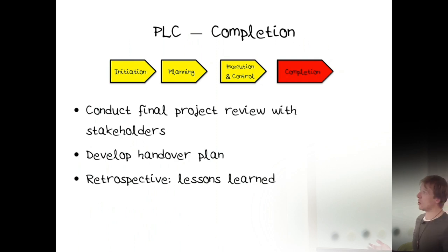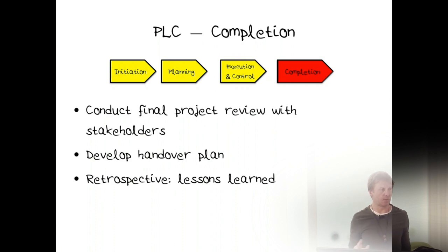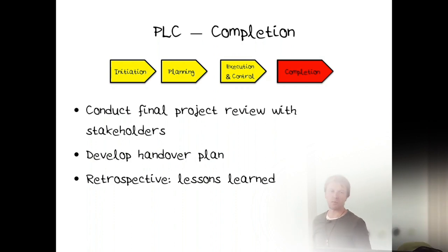And then you complete the project, which means that you have some form of project review with the stakeholders, with those who are interested in this. You develop some form of handover plan, because typically it's not the same people responsible for maintaining something as the people who develop it. Typically you have junior people maintaining stuff, because that's how they learn. And then you have some form of retrospective, to figure out what can we learn from this project. Is there anything that went well, anything that didn't go so well? Should we modify anything for future projects?